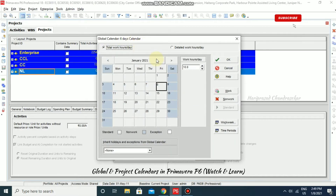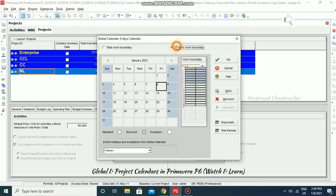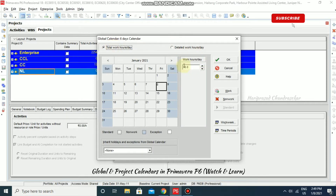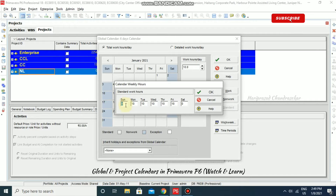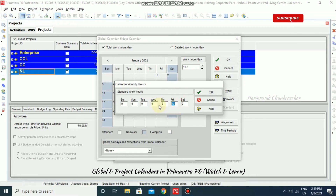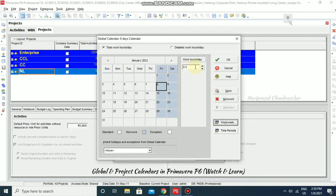In the 6-day calendar, when you click Modify, you can choose between Total Work Hours per Day or Detailed Work Hours per Day. The total work hours defaults to 10. To change this, go to Work Week. There you can see the values and specify them. In Gulf countries, Sunday is the start day of the working week, so you can specify 8 or 9 hours for Sunday, and then 9 hours each for Monday, Tuesday, Wednesday, and Thursday. Friday and Saturday are normally holidays, so set those to 0. Click OK and everything will be updated.